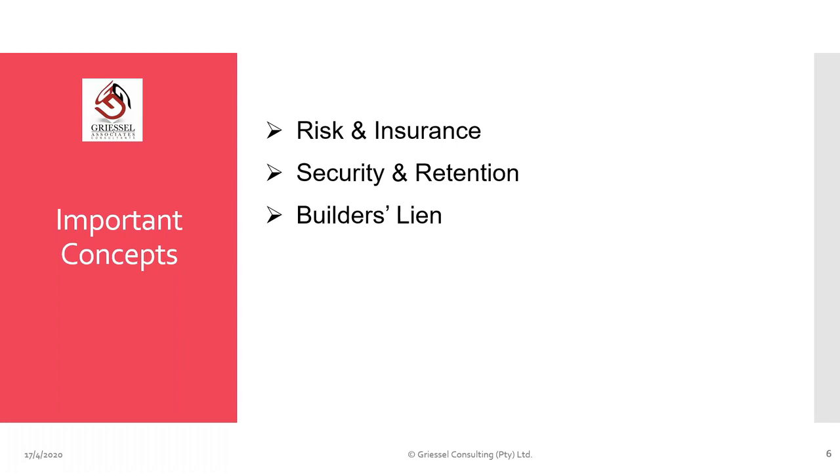Where you have sole access to the site, obviously you can lock the site and you can prevent anybody to have access to it. In such a case, you can exercise your builder's lien for as long as you keep presence on site and keep the site under your control. But where we have occupation by the client, as in the case of renovations and additions, that is definitely not possible to keep that presence on site, and that is where one has to relinquish the lien but may ask for a payment guarantee.